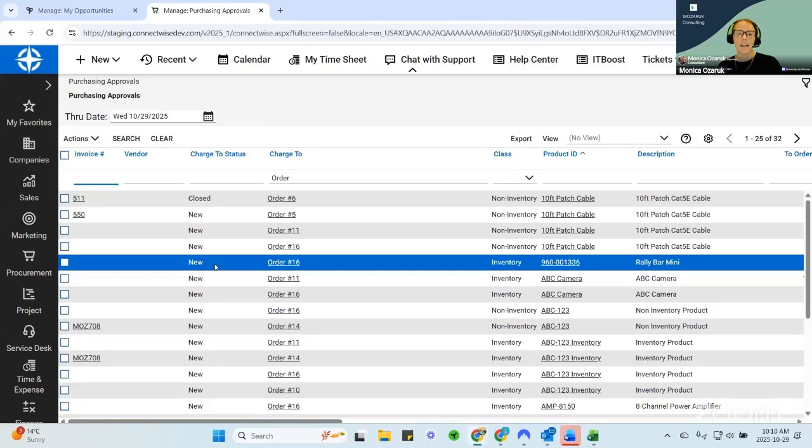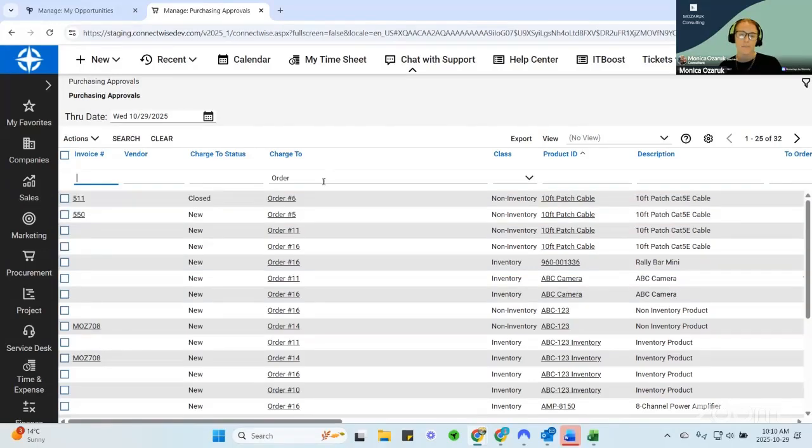If you have a status that says down payment received, for example, that might be the green light to approve products for purchasing. And that's where, when we talk about project management in the coming weeks, your sales order and project statuses can make a huge difference to the flow of your projects.